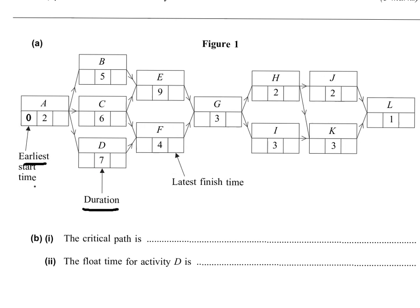So, to find the earliest start time for B, you're going to do 0 plus 2. So that's 2 here, and C as well, and D. Now we're going to look at activity E. Activity E cannot start until B and C are finished.